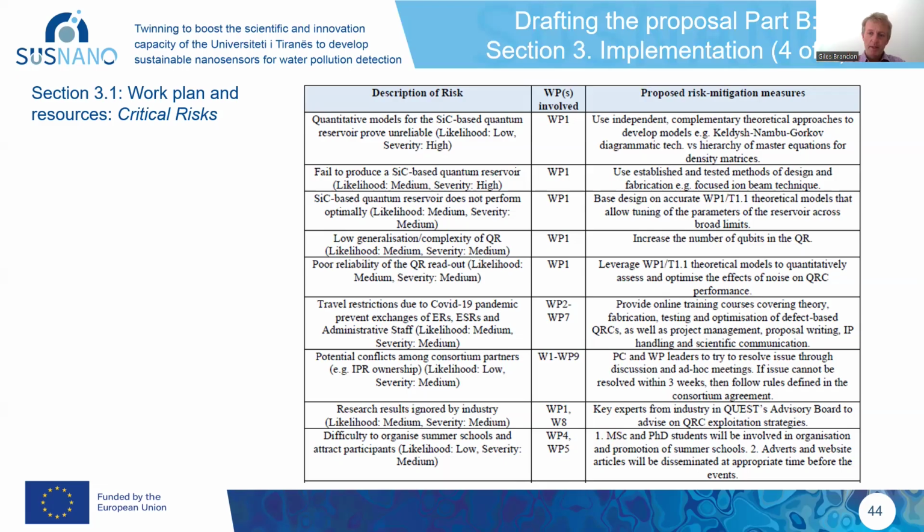So at the same time, I asked each work package leader to write their work package description and to define their deliverables, and also to write the text for describing the scientific and technical objective relevant to their work package. At the same time I was asking all of that, I said to them, look, please also brainstorm. I want you to come up with at least 2 very specific, very concrete risks that might occur for your project. That not only describes that risk very concisely, but also please come up with some sort of risk mitigation measure.